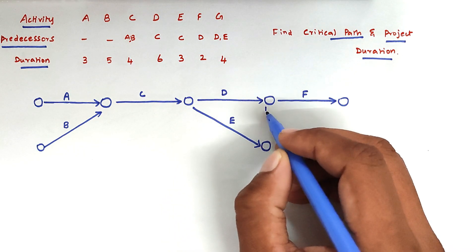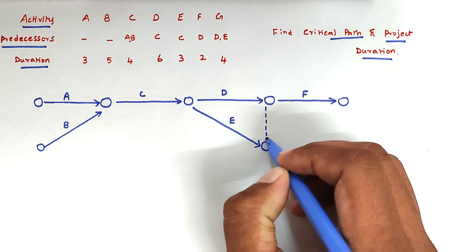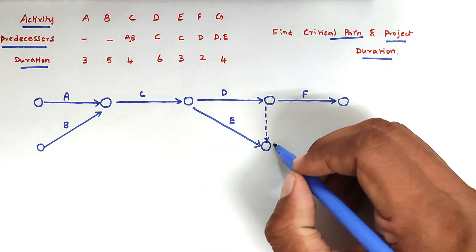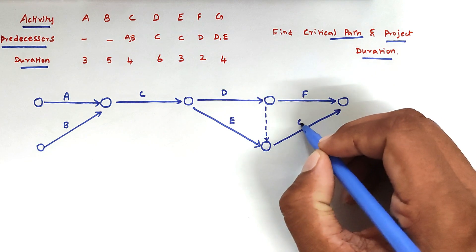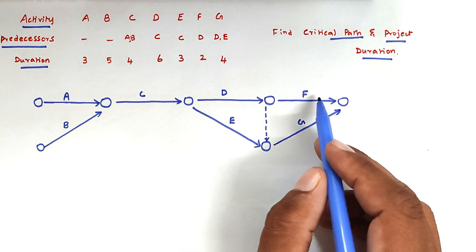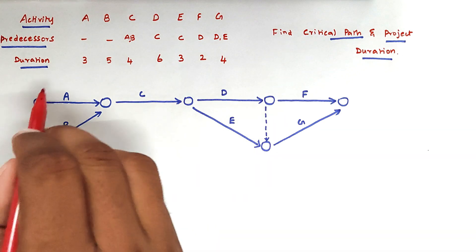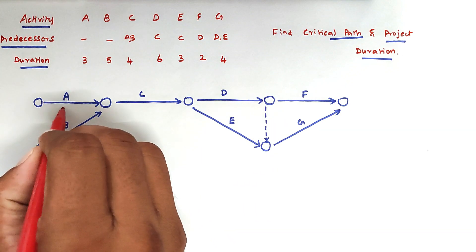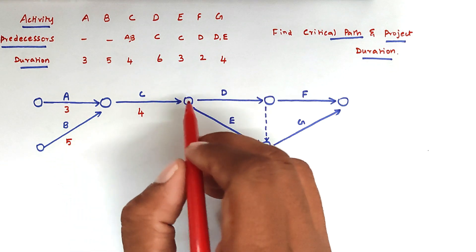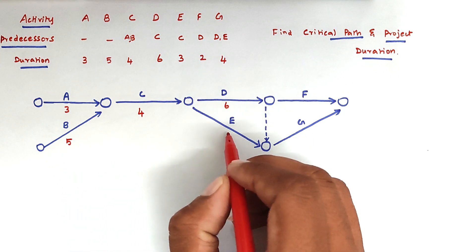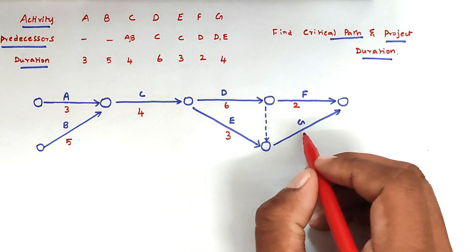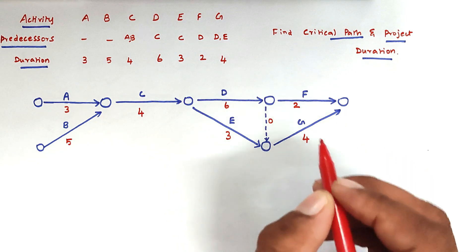Since G activity has both D and E as precedent activities, we can draw one dummy activity to connect them before drawing G. Now we can write the corresponding durations: A is 3, B is 5, C is 4, D is 6, E is 3, F is 2, and G is 4. For the dummy activity there is no duration.